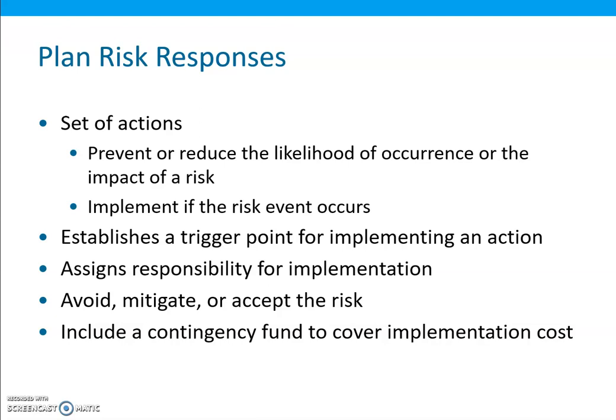Mitigating the risk involves taking actions to reduce the likelihood that the risk event will occur or to reduce the potential impact. For example, reducing the risk of multiple redesigns of a customer's website might require reviewing other sample designs with the client earlier in the project. And accepting the risk means dealing with it if and when it occurs, rather than taking actions to avoid or reduce the impact.